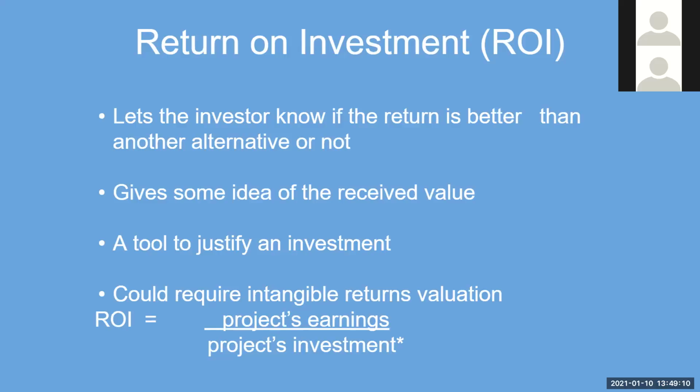So it tells you the earnings of your project divided by the cost of your project. In some cases, like a case of a crisis line, it's hard to quantify the earnings because you're not necessarily getting any income. So you can use other types of income to find out. For example, if you're receiving grants to support the crisis line or donations that came in indirectly because people like the cause and they want to support it, you can account for those types of income and consider that to be part of your project earnings.